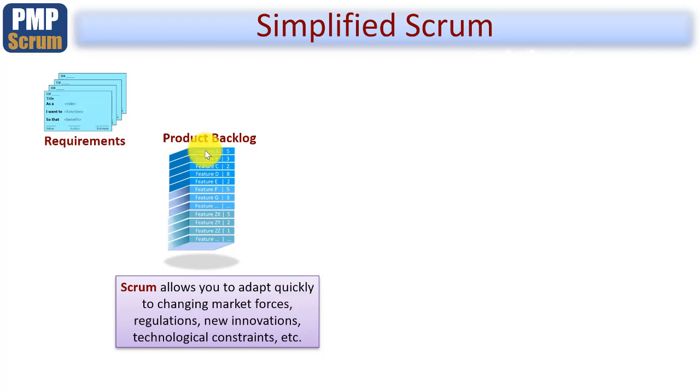So we've got this prioritized product backlog with features. The early ones will be fine and detailed so that you could build 1 or 2 or 3 or more features in the form of sprints within an increment. As you go further down the list, these features out here, although not shown, will be very much larger features, often called epics, which we'll touch on later, where they're broad brush and not much detail is known.